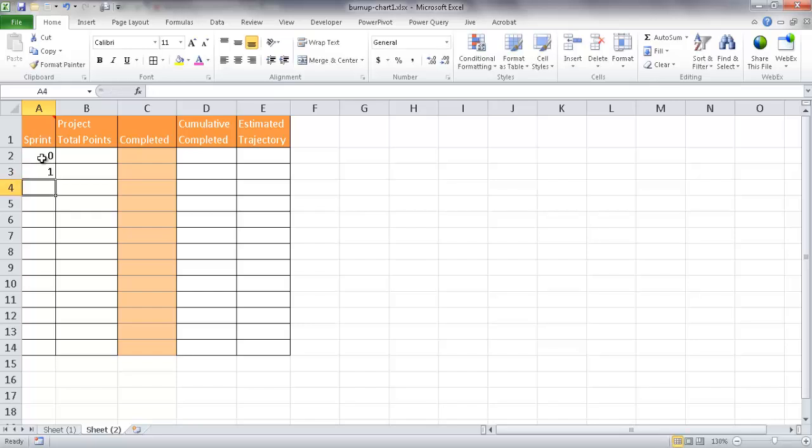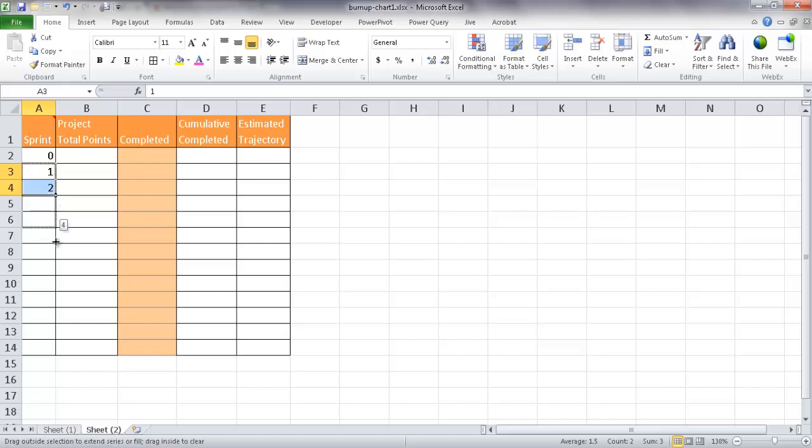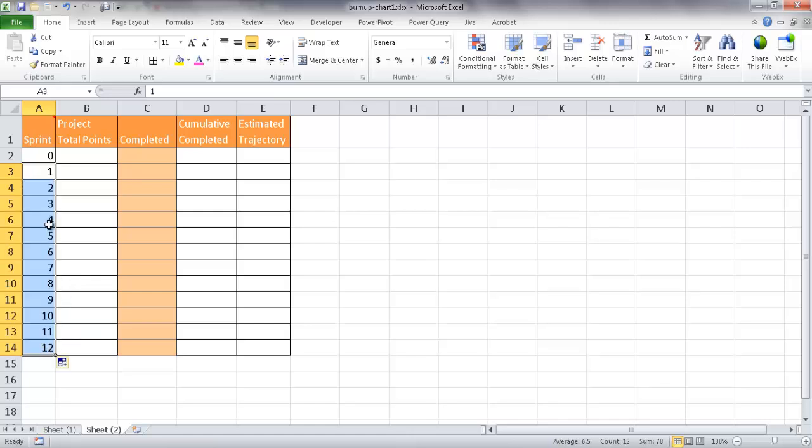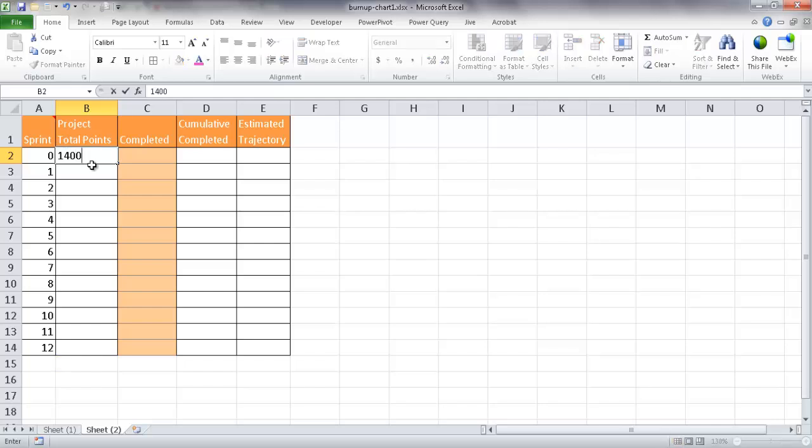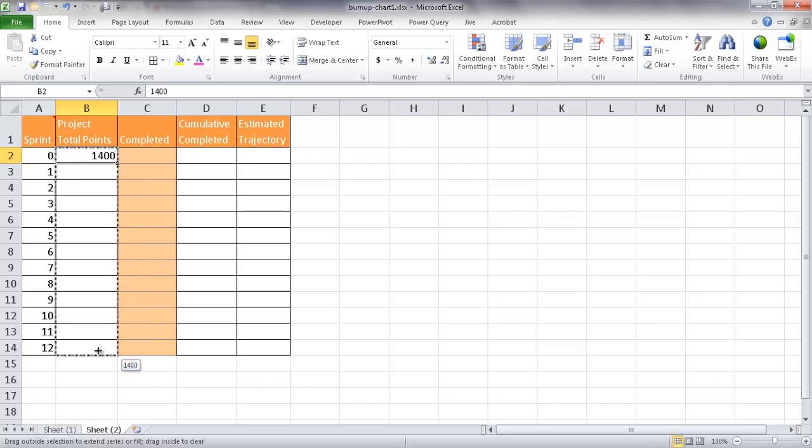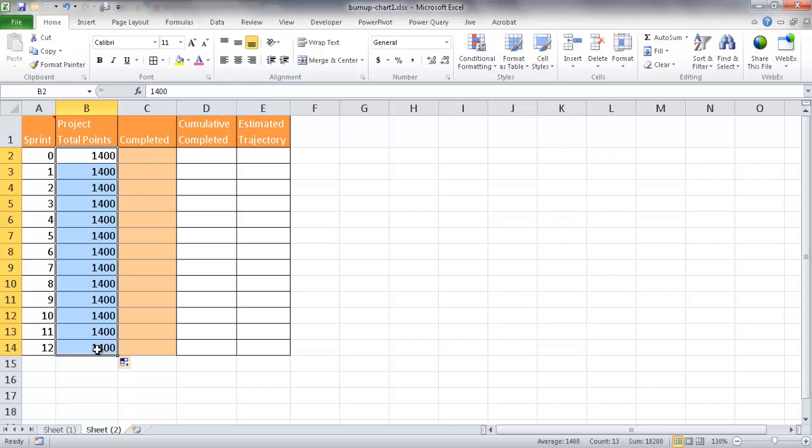So when you really think about it, maybe that's the first month, this is the second month. And I'm going to go ahead and just, once I enter that in, I'm going to go ahead and just instead of typing it all down, I'm going to bring the fill handle here and kind of drop it all the way down there. And so I get my 12 sprints here. Now the project total points, this is kind of determined by the project team in terms of like how many points would this total project take. So let's say for example, it will take 1,400 points total.